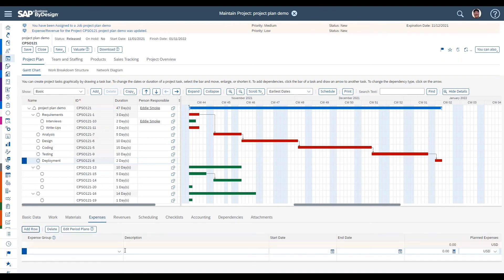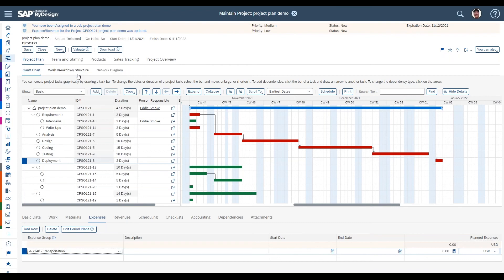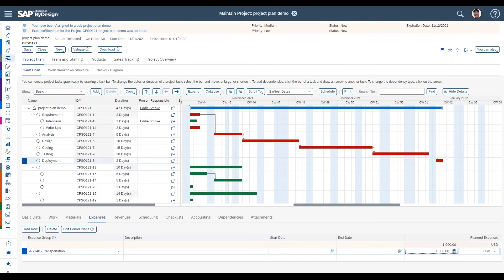To add a planned expense, add a row and select an expense group — these align with the expense groups used for expense reports and supplier invoices. For example, on the deployment task we might expect transportation-related expenses of around $1,000. You can add as many expense types as needed. If you leave the date range open, the system spreads the amount over the entire project duration. For specific periods, use multiple line items with specific dates, or use the period plans option for fine-grained control.